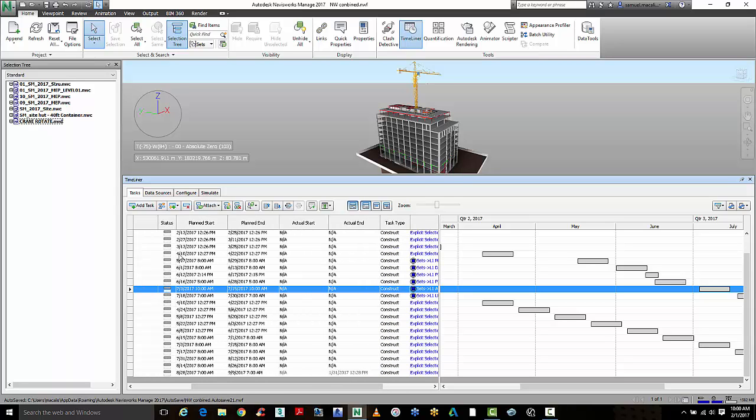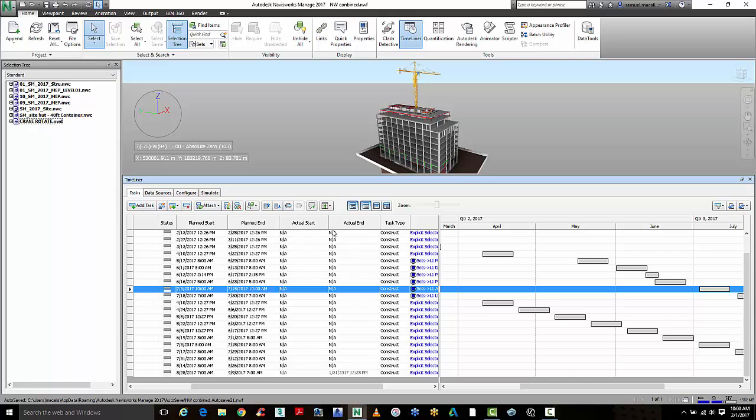So let's say we've got a construction program where a certain item, say the air handling units, is meant to be installed on a certain date. And in actuality, they varied from that date. We can start to import this into Navisworks Timeliner and compare these and then adjust our construction program as needed.